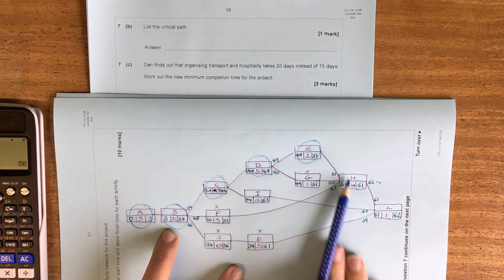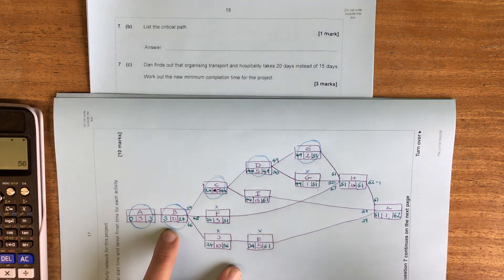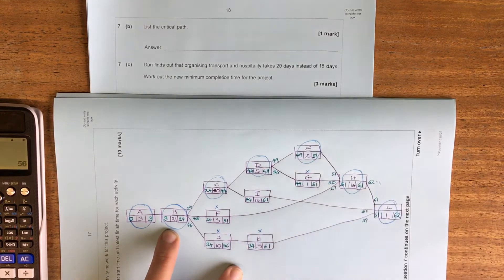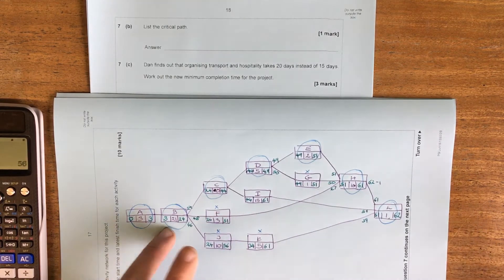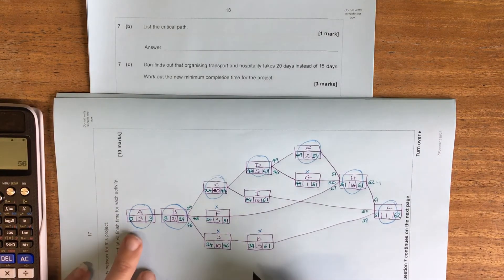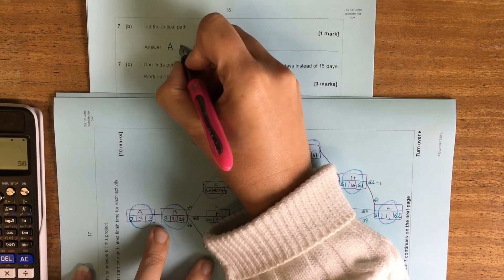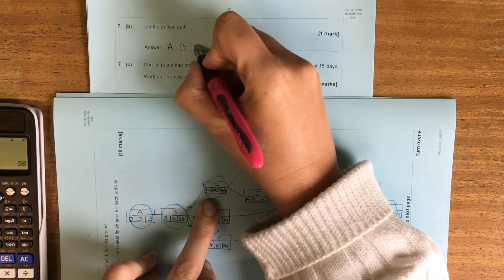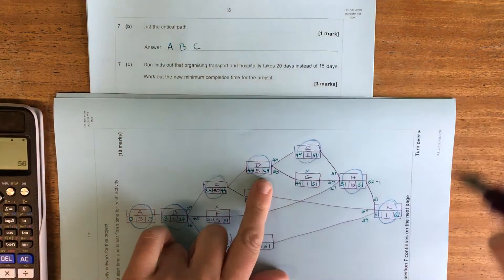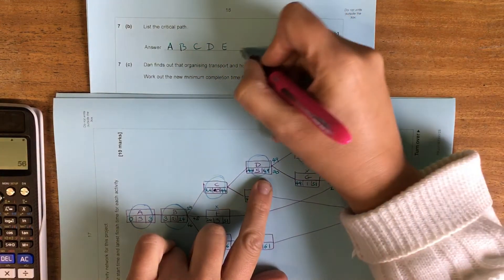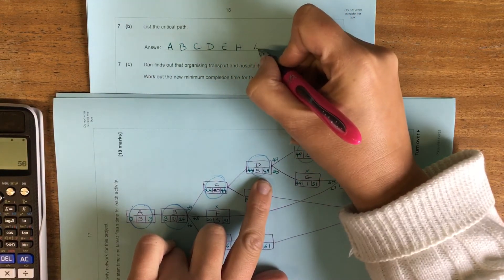If you've got a critical one, something coming out of it is going to have to be critical. So these two are also going to be critical. So our critical path goes A, B, C, D, E, H and L.